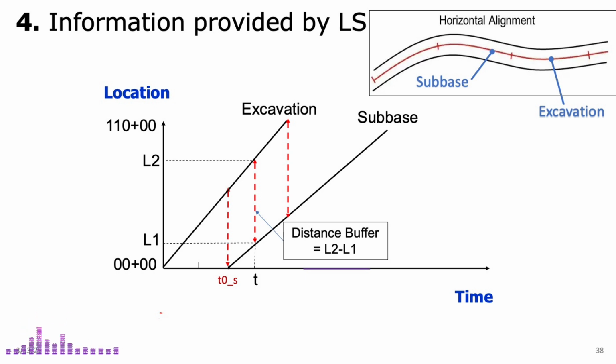that specific time. It is important to remember that you can only measure the distance buffer when both activities are occurring simultaneously. If excavation finishes before subbase work begins, or if subbase has not yet started, there is no distance buffer to calculate. Now, you might wonder, why is this measurement so important? The answer lies in how construction projects are managed.